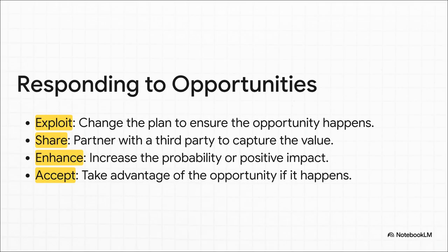But here's the mindset shift that really matters. Risk isn't just about bad stuff. You have positive risks too, opportunities. And you have a similar set of plays. You can exploit an opportunity, changing your plan to make sure it happens. You can share it with a partner. You can enhance it to make it even bigger. Or you can just accept it and take the win if it comes your way.